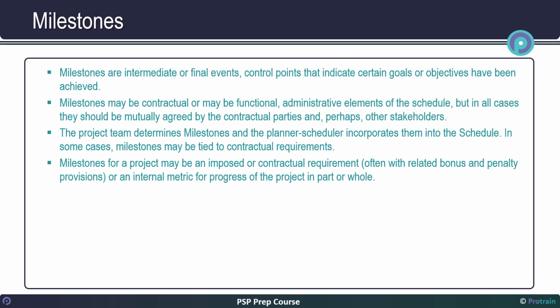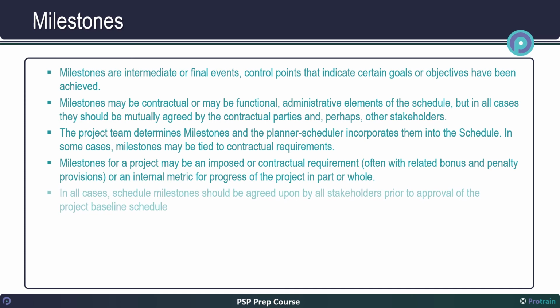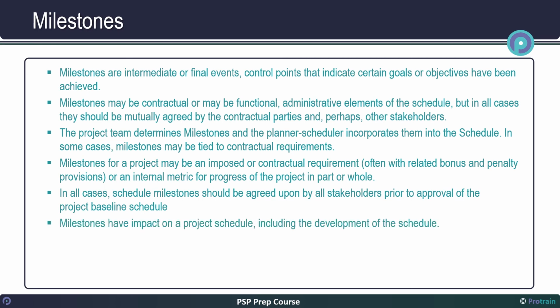Milestones are often related with bonus and penalty provisions in the contract. In all cases, schedule milestones should be agreed upon by all stakeholders prior to the approval of the project baseline schedule. Milestones have impact on a project schedule, including the development of the schedule.